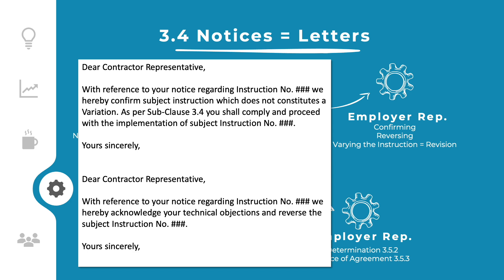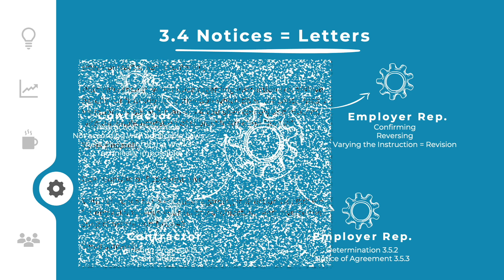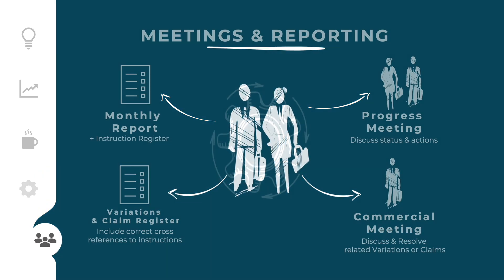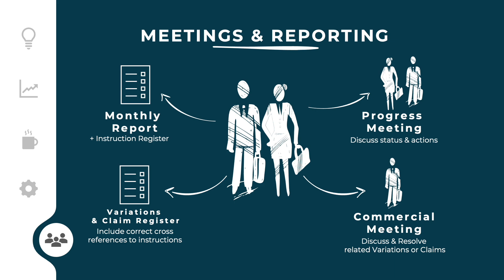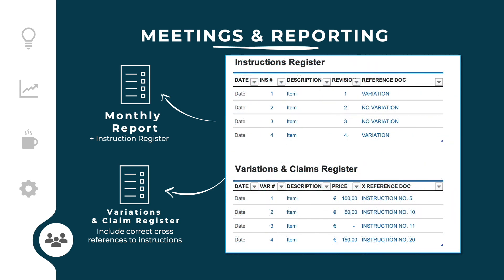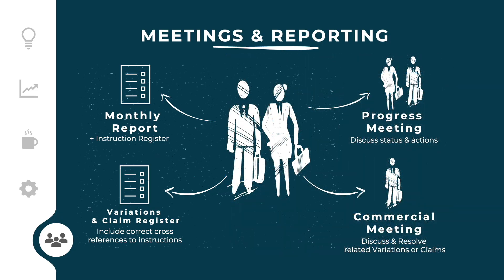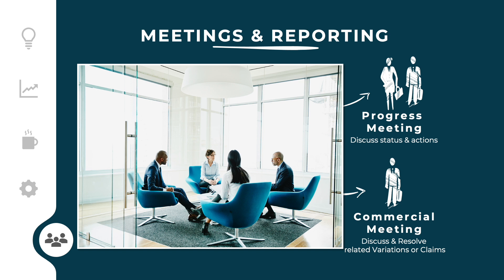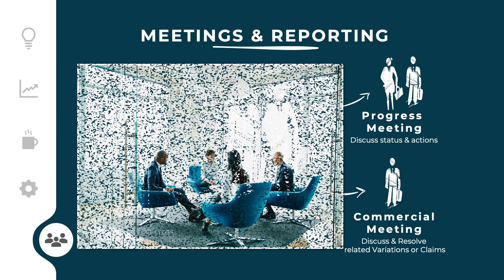For good contract management, it is recommended to prepare a set of standard letters and notices which support timely responses. To manage and control the instructions, the contractor shall prepare and maintain an instruction register, which shall be included in the monthly progress report. The contractor shall also prepare and maintain a variation and claims register, and clearly indicate which instruction is related to which variation or claim. The parties shall conduct regular progress meetings in which the completion status of instructions is discussed and execution issues are resolved. Regular commercial meetings shall also be held in which instruction-related variations and claims are discussed and resolved.